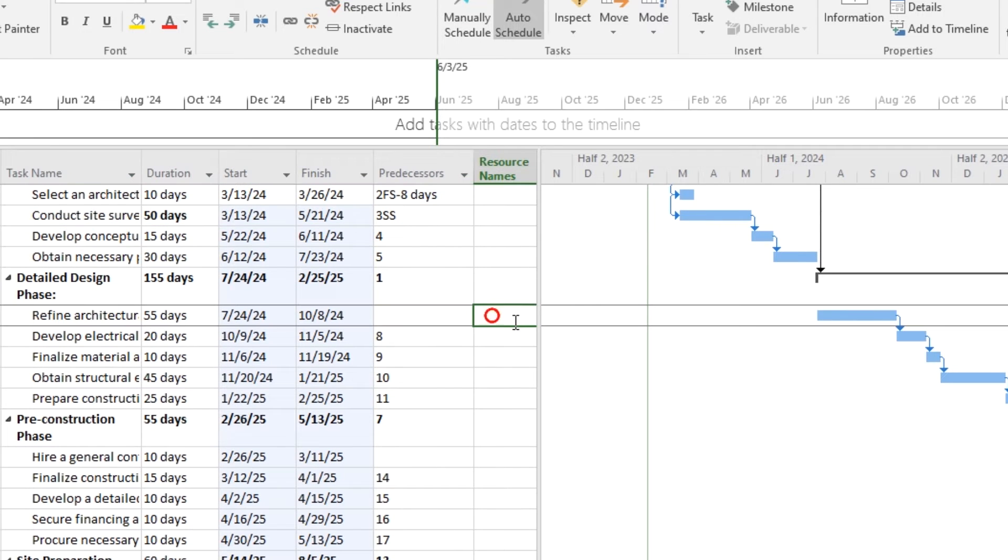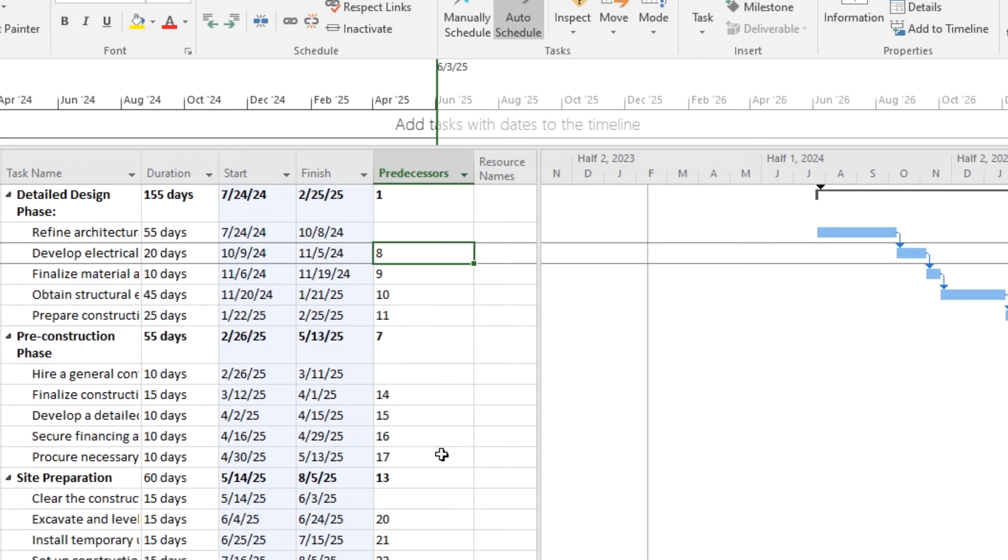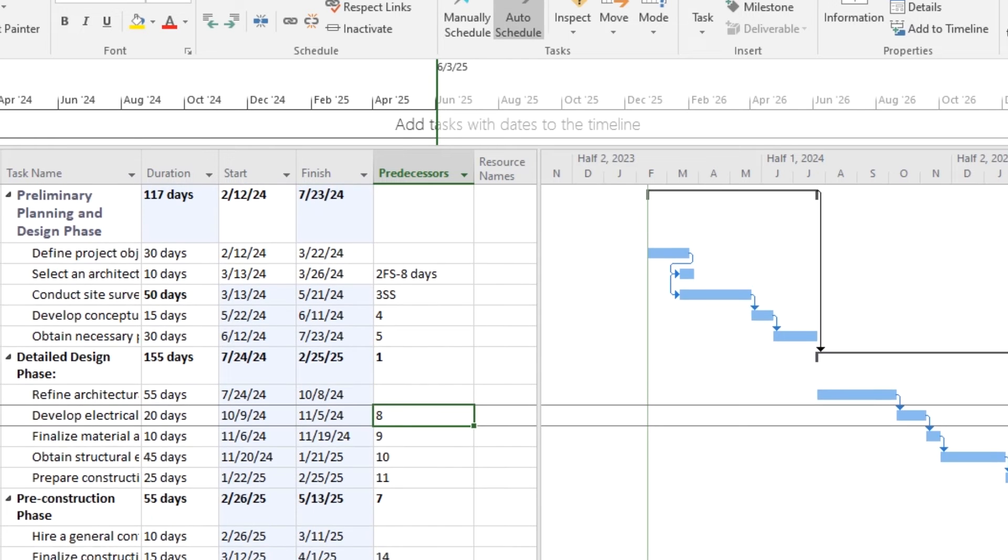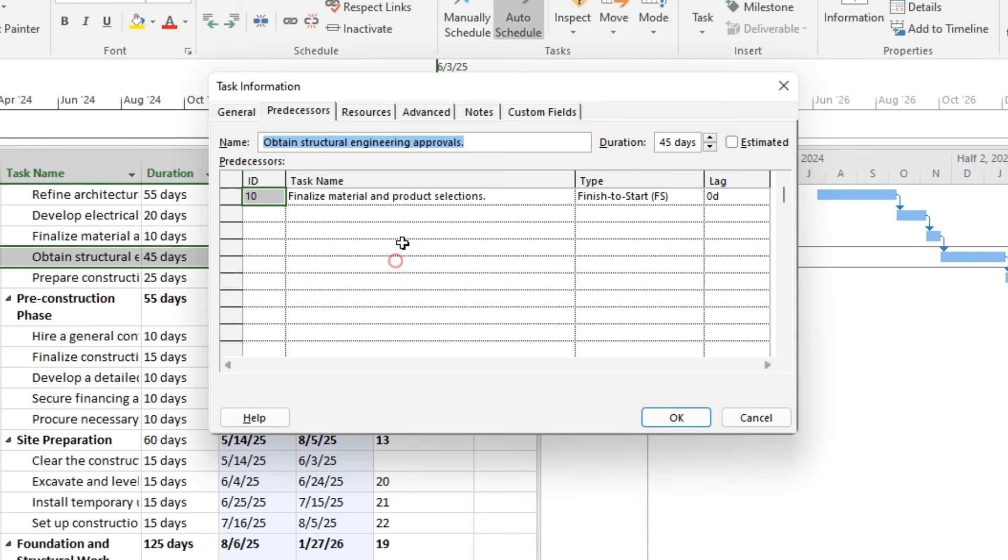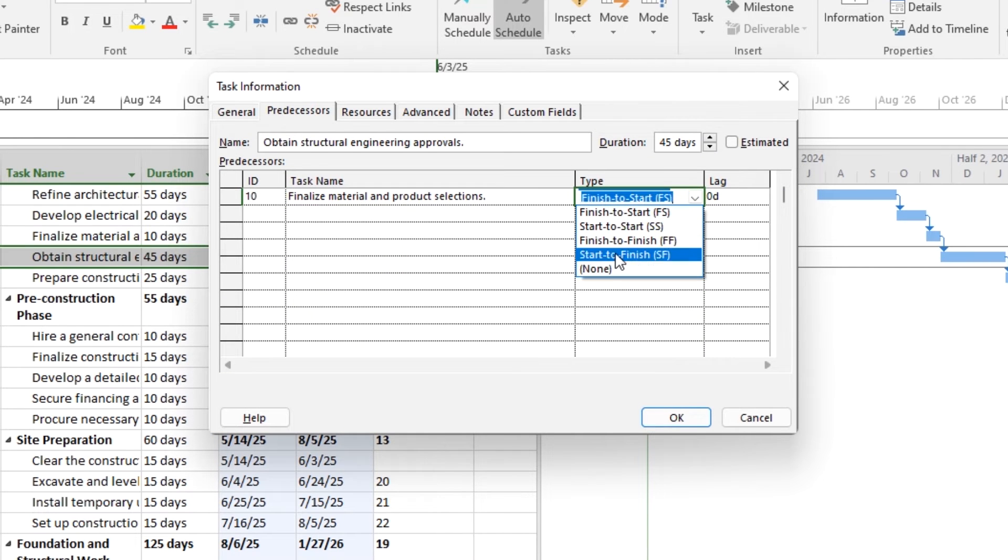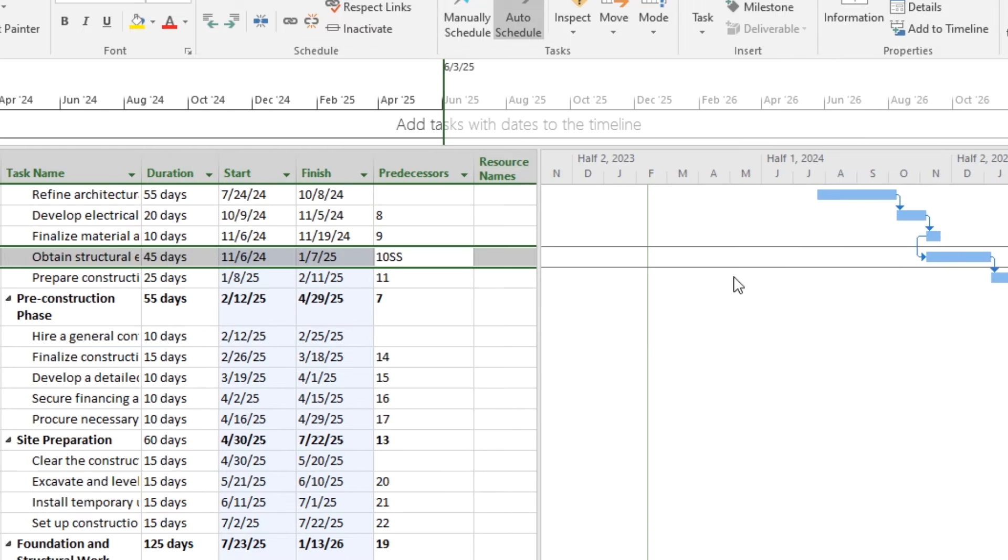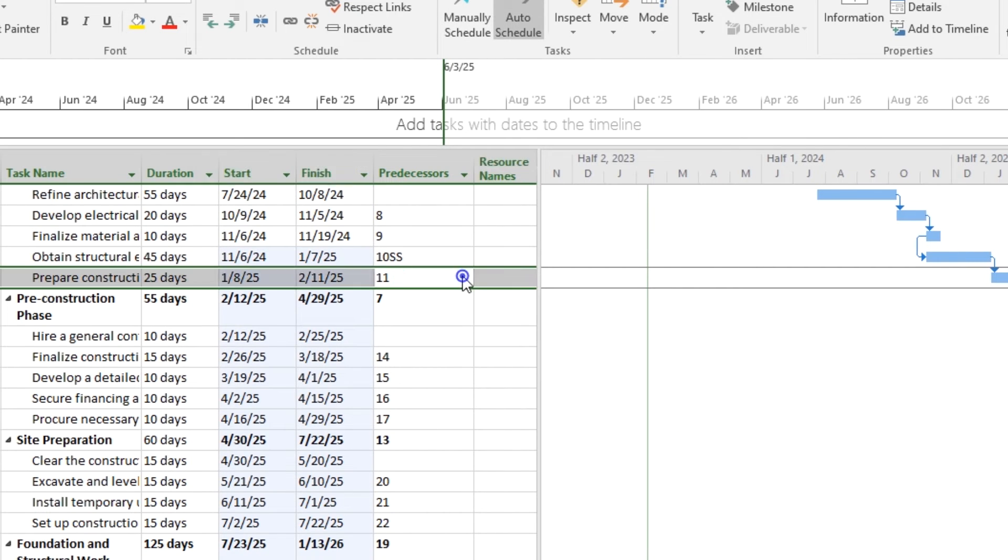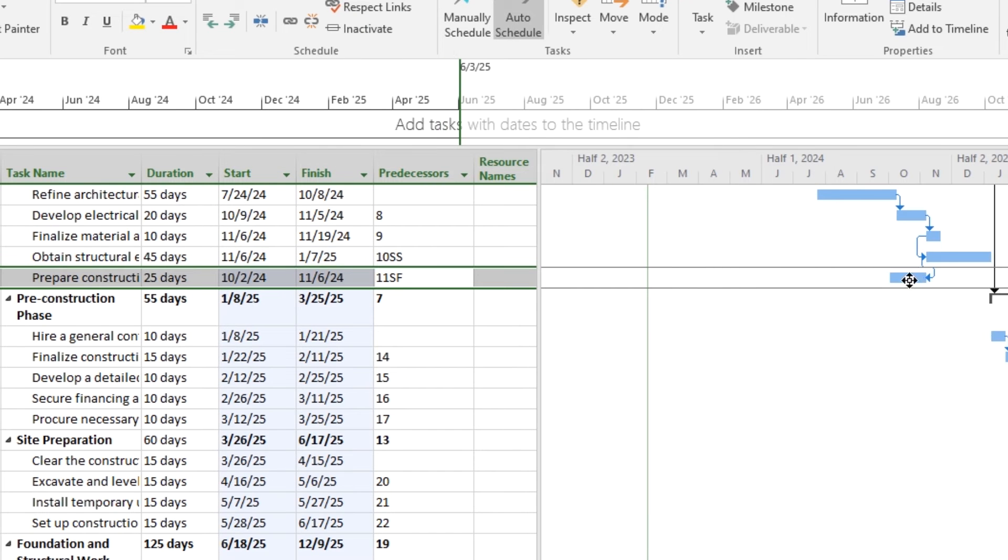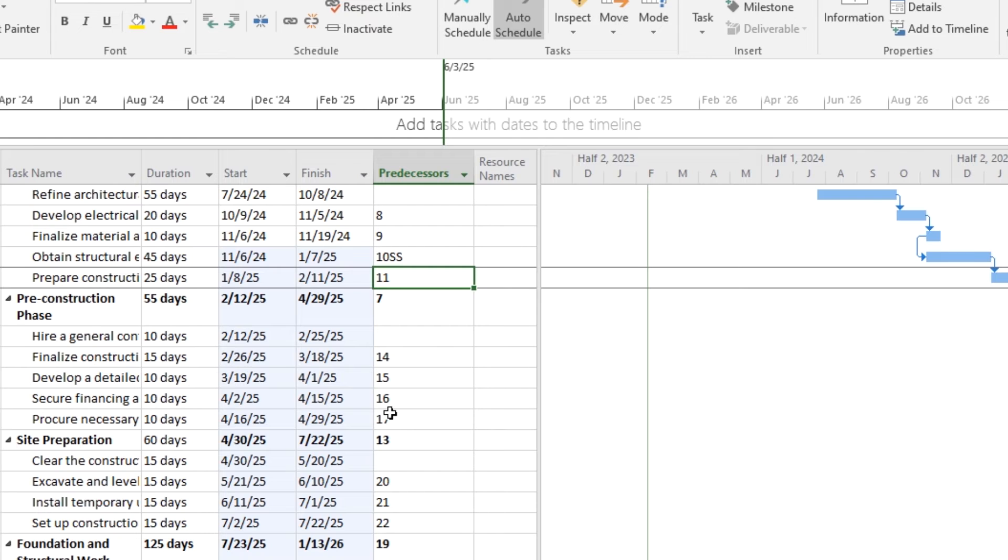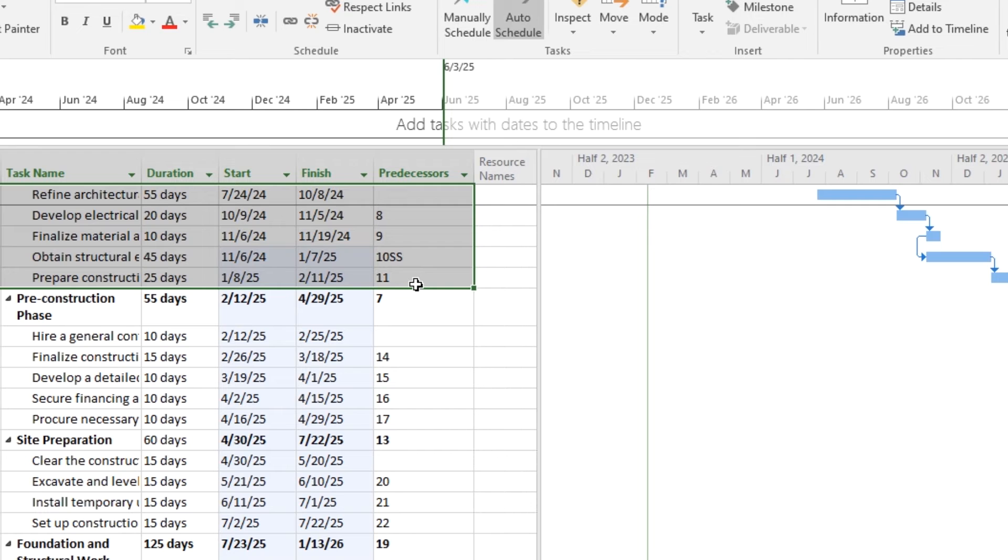You can see that the linked task will now be connected with a line on the Gantt chart indicating the dependency between them. Repeat these steps as needed to link additional tasks. Keep in mind that the task IDs, task names, and durations may vary depending on your specific project. Adjust the settings and dependencies according to the specific requirements of your project plan. Remember that linking tasks creates a sequence, and changes in the predecessor tasks can impact the successor tasks. It helps in creating a logical flow in your project schedule.